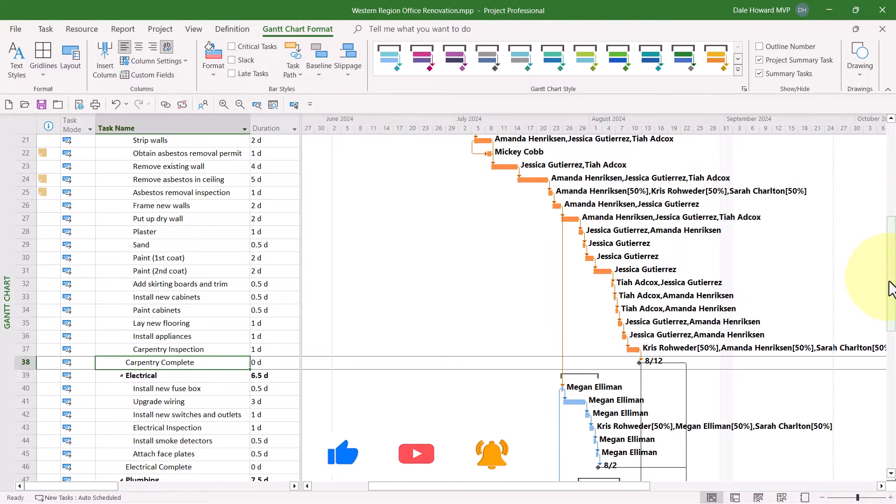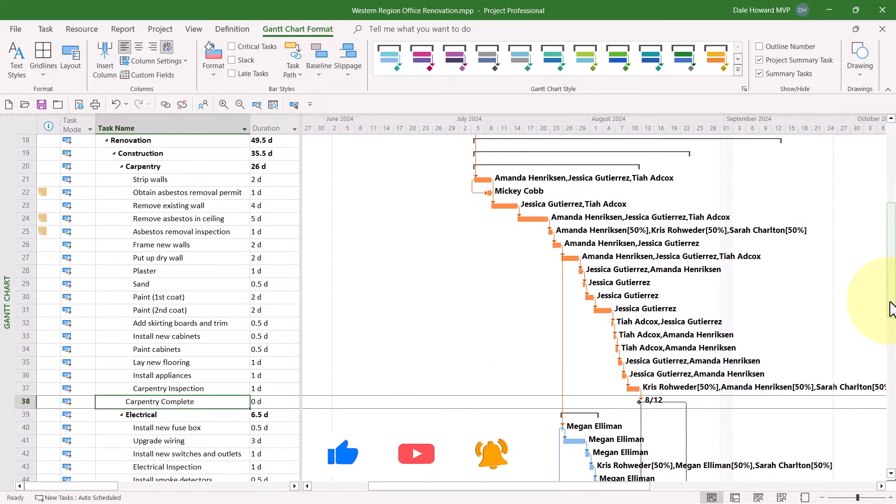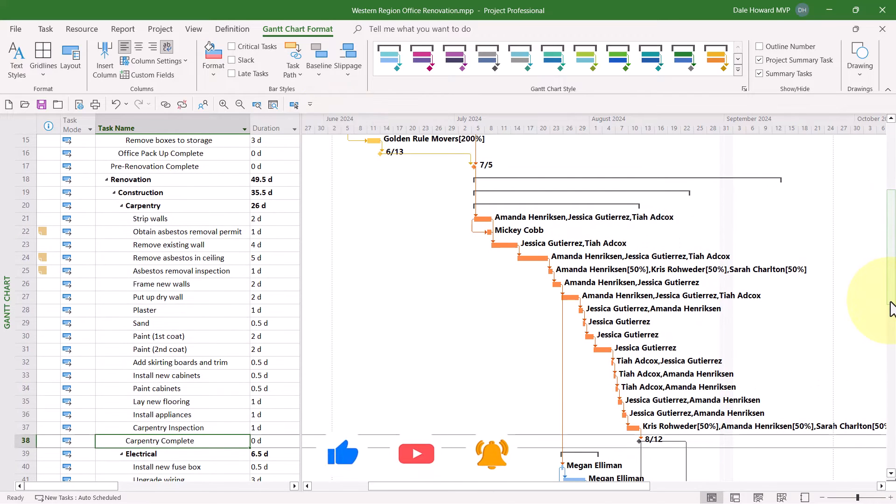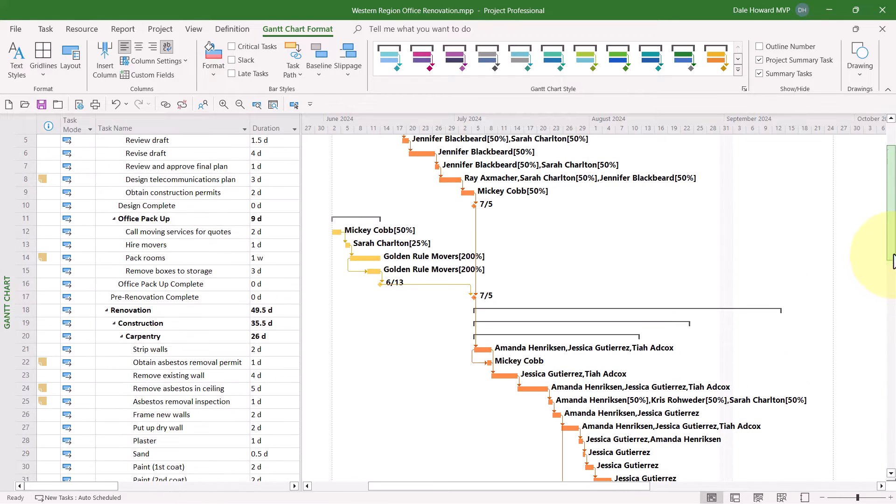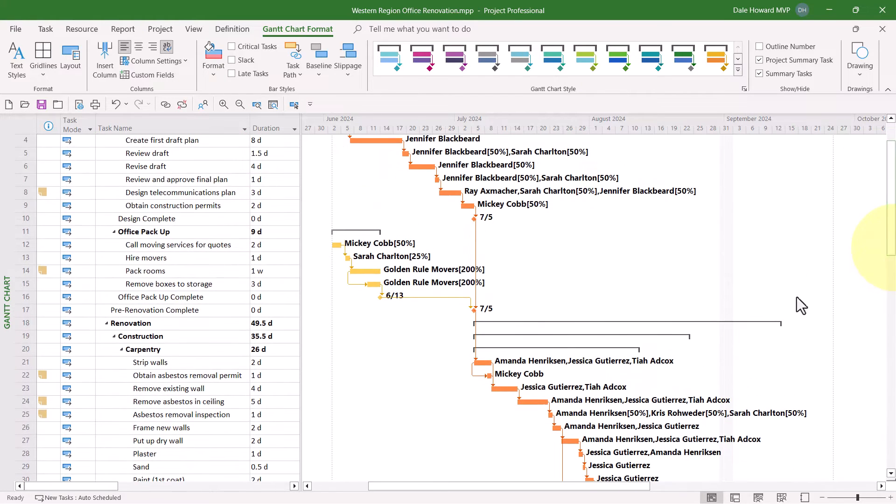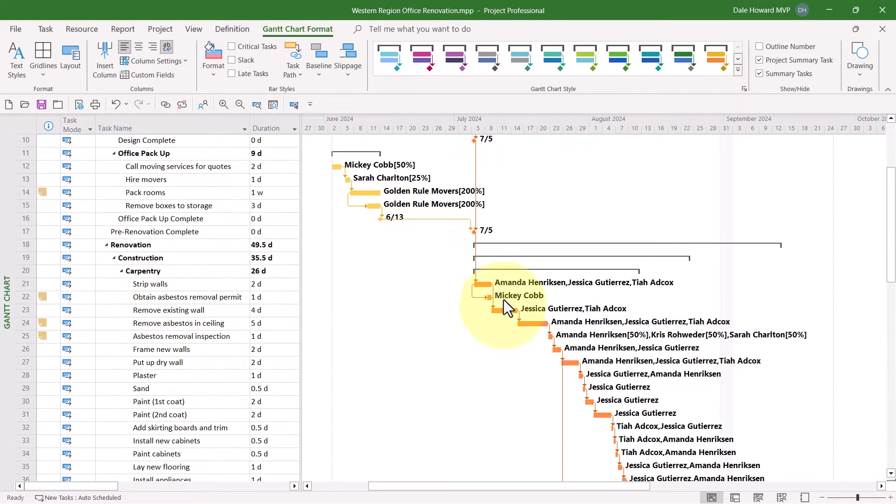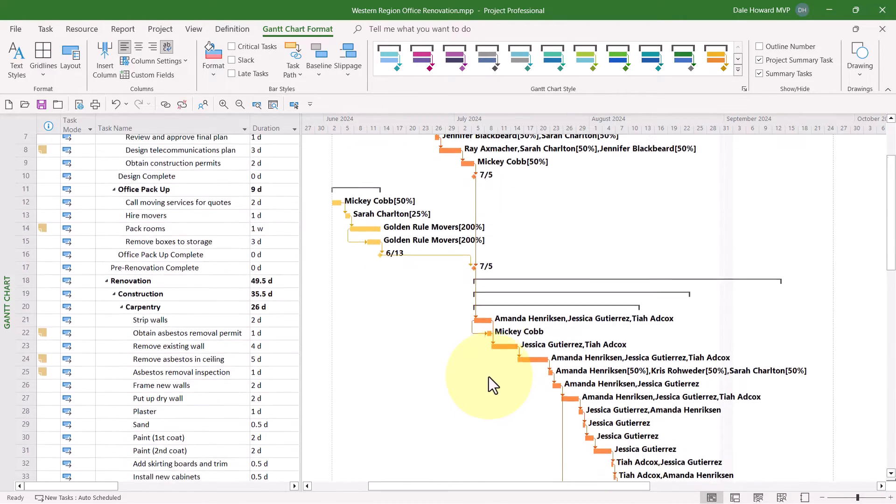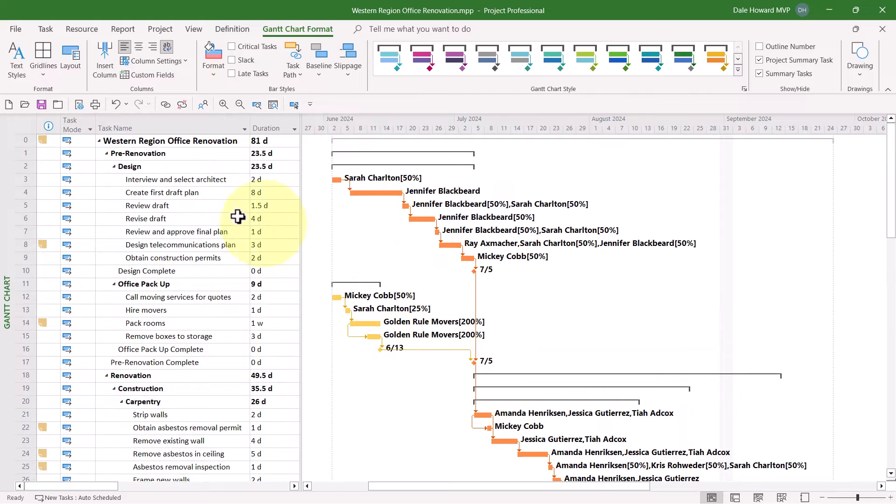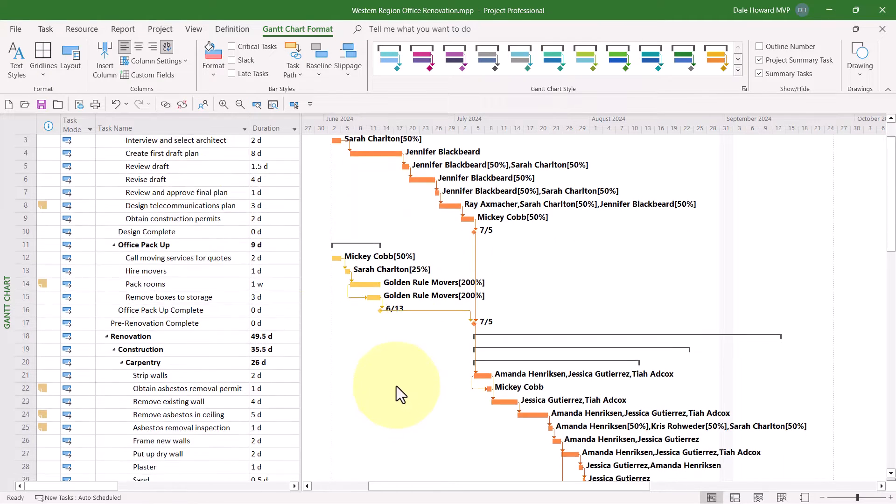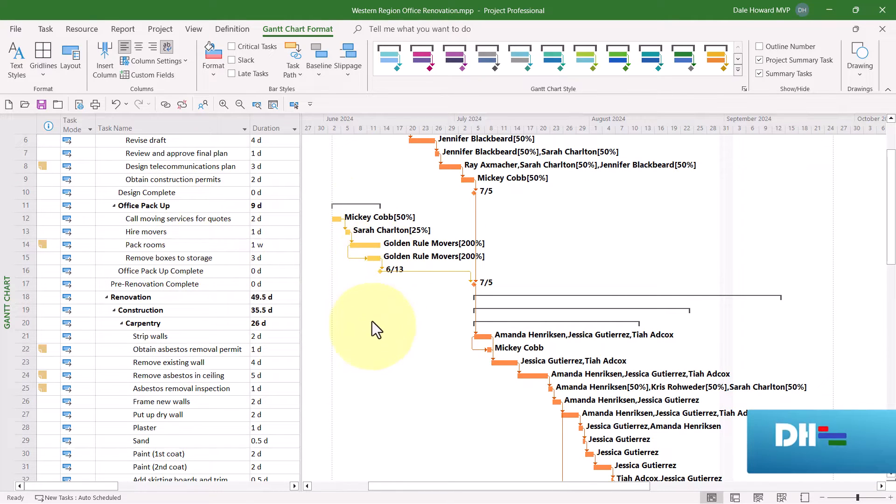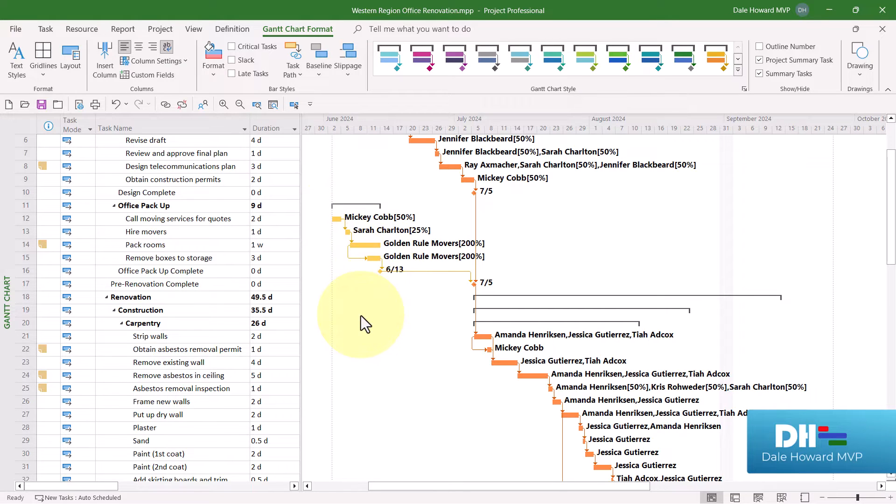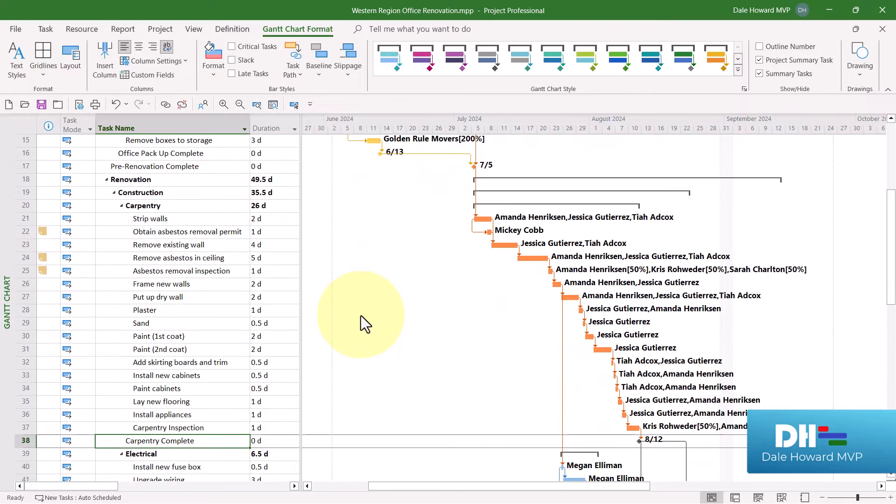When I select this option, Microsoft Project will format the Driving Predecessors Tasks Gantt Bars with the orange Gantt Bar color. Notice that all the tasks in the Carpentry section are orange, all the tasks in the Design section are orange, but the tasks in the Office Packup section are still yellow. That's because these tasks do not directly drive the start date of my selected task.